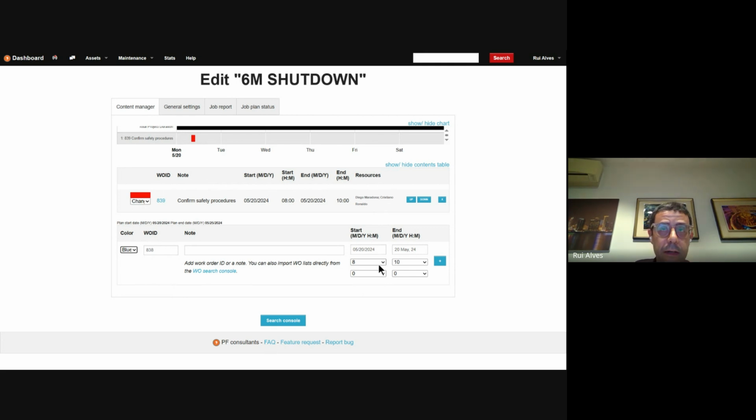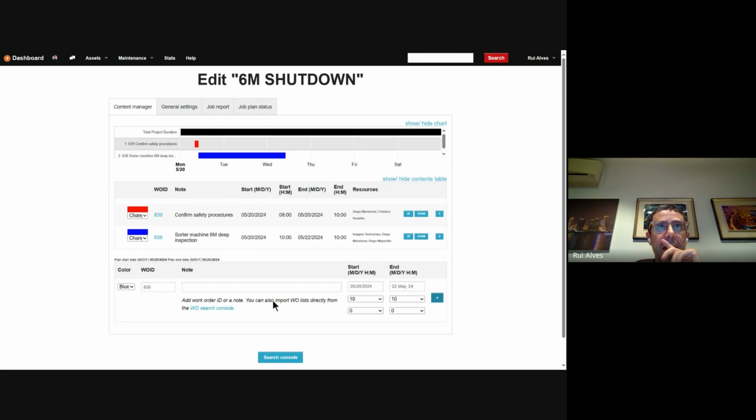That takes a bit longer, so we'll do it after this one. This one ends on the 20th at 10 o'clock, so we'll start at 10 o'clock for this job. But this will take longer, let me see, to the 22nd. So it's blue, it's 838, an inspection of some sort, and it will start on the 20th at 10, right after the safety inspection, and then it will go on for 2 days. Let's pull that in. And there we go, it takes longer, of course.